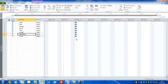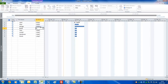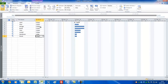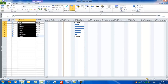As you can see, all tasks have lined up exactly on the start date. The question marks show that Project is assuming they are estimated tasks. I want Start to be a milestone, so I'll set its duration to zero. I'll set Plan to two days using the spin control, then Design to five, Build to five, Test to three, Install to three, Handover to one, and Finish as a milestone.